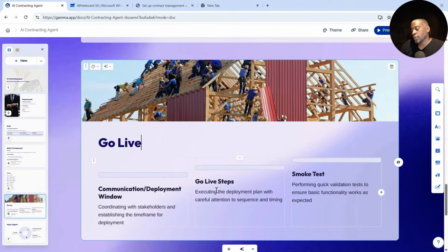Then you come up with your go live steps. Can we deploy this during business hours? Sometimes it's a new application, and you're not replacing something already in use. Even if you're deploying in parallel to something that's already in use, I love to deploy these during business hours, because if something goes bump, other teams like infrastructure or licensing, security or data security are available. And if we need a rush or some pressure, we have management or a product manager or scrum master in place to help drive and get the other teams' attention that we need help.